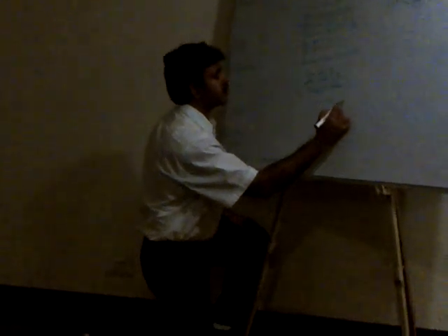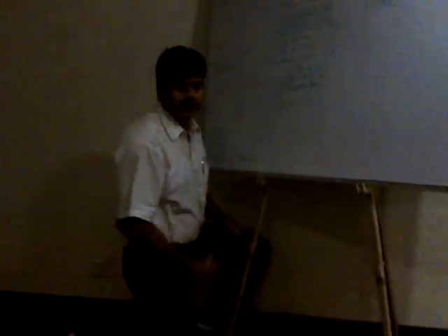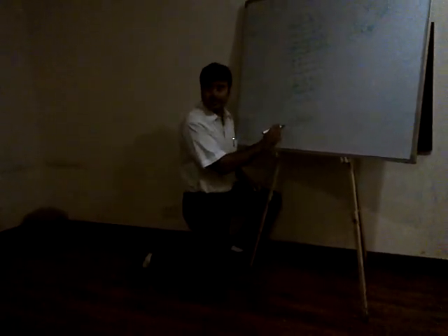So in human resource plan, what happens? Where is project human resource management? There we have seen plan human resource. You came out with your human resource plan, and this human resource plan was fed as an input to this. Similarly, when it comes to project risk management, we had plan risk management, then identify risk. Isn't it? Risk management plan was fed as an input for identifying risk. We came out with the risk register as an output of identify risk.